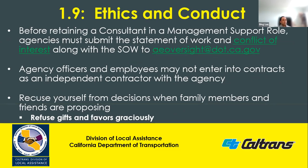A note about ethical conduct. If the contract is to hire a consultant in a management support role (CMSR) prior to advertisement, there are considerations and requirements for ethical conduct and assurances of no conflicts of interest. You need to fill out Exhibit 10U, which is a conflict of interest statement. That must be filled out and submitted along with the contract scope of work and the agency's own conflict of interest policy document to the Division of Local Assistance. DLA staff will review it, and these documents will then be forwarded for review by FHWA, which requires FHWA approval prior to the advertisement.